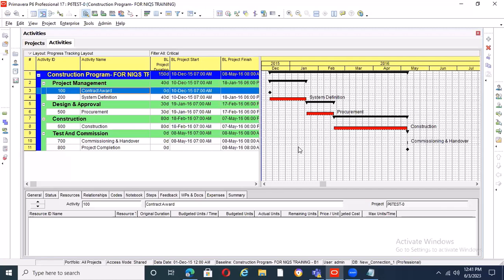We have future delay with schedule impact, and you have future delay without schedule impact. But the most important is you want to work on your present delay and your future delays. For me, the money maker is your future delays and not the present delays. Your present delay, there's a problem already. But your future delays help you to track and make sure your project doesn't get into problem.